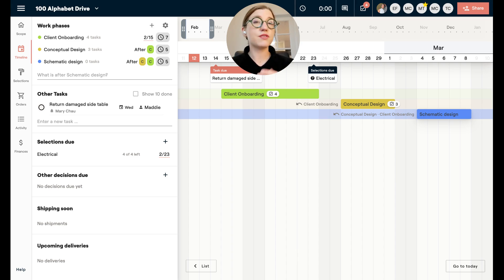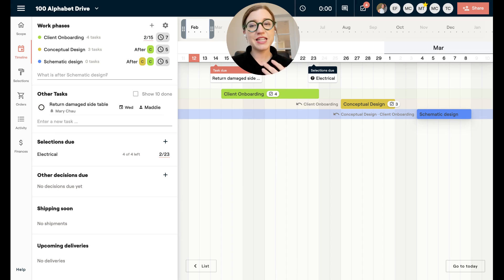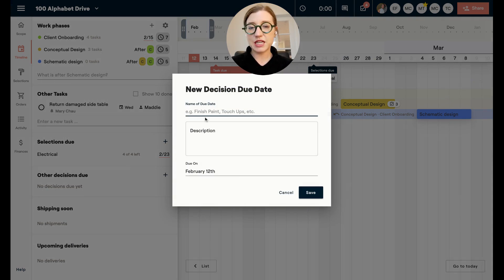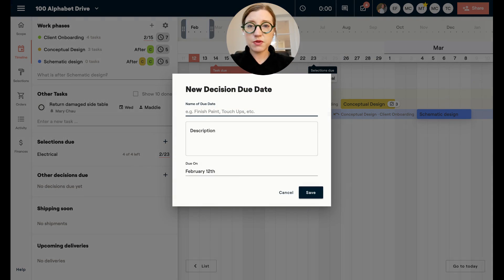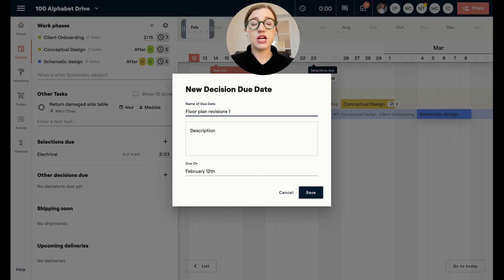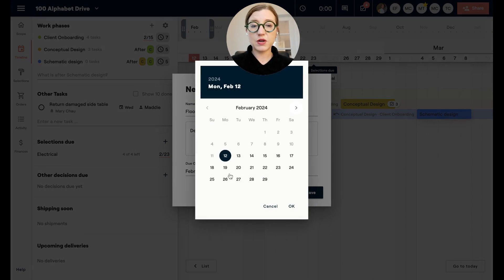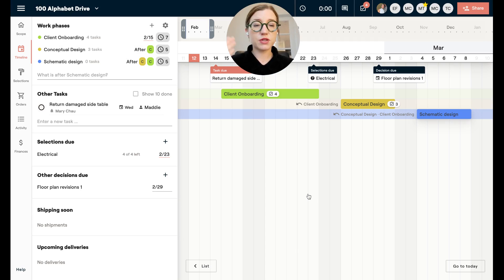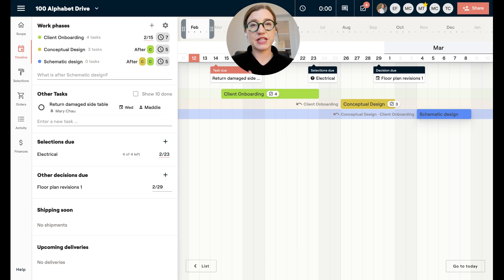You can also set other decisions on the timeline — things like floor plan revisions, milestone payments, or anything you want to do to keep your team in line. This is totally customizable. For example, you can plan out multiple floor plan revisions and set them on the calendar to set expectations for your team and your clients.